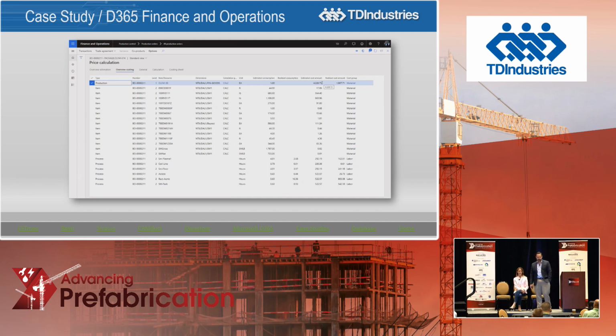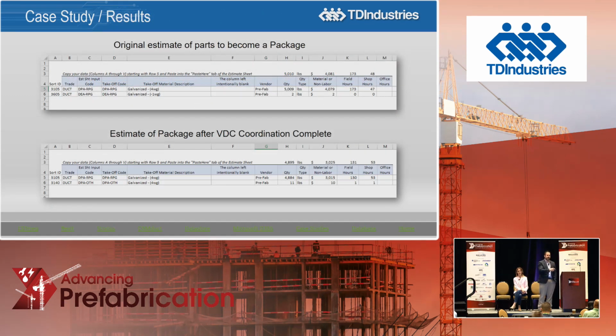Then again, the most important thing is what did Precon estimate, what did VDC change that changed what it would cost us, and then what it actually cost us. I don't know if you can see that from where you're sitting, but we have a quantity. Precon said it was going to weigh a little over 5,000 pounds. After VDC got done with it, it was 4,800 pounds. The material field hours went down after VDC modeled it, from 173 field hours to 130 field hours. So the fittings that they changed were impactful to the field, and the shop hours went up from a projected 47 shop hours to a projected 53 shop hours, right? Which is where we want our labor. We want our labor to be more in the shop than in the field, okay?